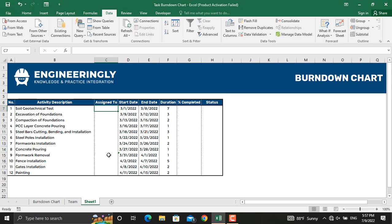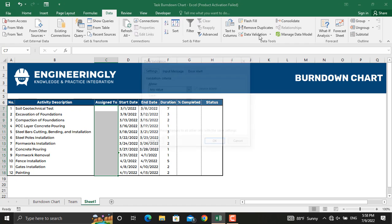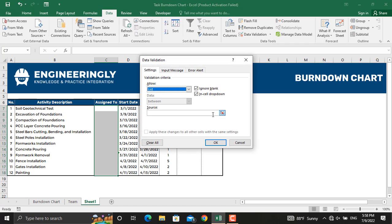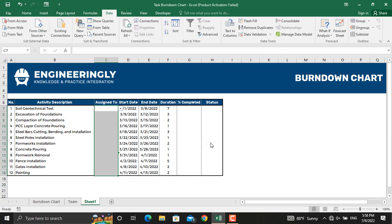We have a list of the project team, and we want a drop-down list to pick a resource name for each activity. To do that, select all these cells, go to Data, click Data Validation, select List, and select the source — the names of our team members. Click OK, and now we can pick a resource for each activity.